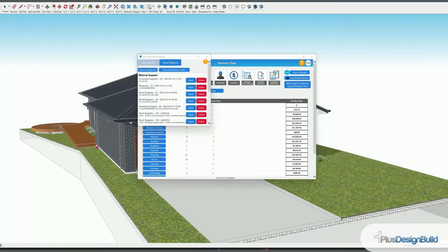In summary, if you're doing jobs as you go and you might not win them for 12 months down the track, it's so important to save them. When you add a new price or update your pricing in Plus Design Build, it's going to update in retrospect — you may have created a job 12 months ago but not actually given it a price. It's so important we have current prices when we send out an estimate to clients. However, archiving prices so we can charge a variation to the job is paramount to staying profitable. Also, utilizing the archives for potential legal issues — if a client or the bank says no, you can go back to your contract and show the price you were paying then versus now. Save the model as revision one estimate, save your pricing every time you get an update, and have a job folder set up.